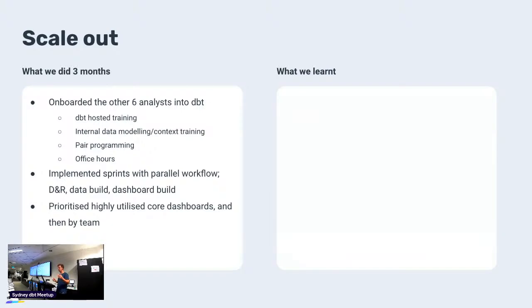But then the real goal was to have the highest impact for the lowest effort. And so we prioritized teams who had a low amount of dashboards, but a high amount of people, right? Because then we could migrate them over from one system to the other. So basically that ended up being focusing on sales, because they have a low amount of dashboards and like 150 people.